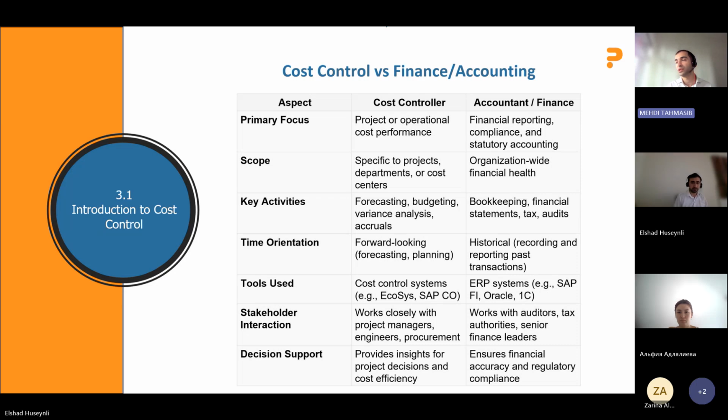If we don't know what the job is, what the budget item is for, we could miss some cost. For example, if we are in a meeting and we hear that there will be a delay in some procurement or delivery, we should understand what the impact will be for the overall project and the overall forecast. For an accountant, it's not important, but for us, it is. That's why we go to the sites.